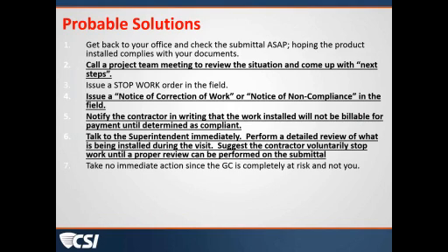Now, it could be the correct product, just as you specified, and not be an issue. The only issue is that he's installing it before he got the approved submittal back. So that is non-compliance with the contract requirements, but it's not defective. So that's just a distinction I wanted to point out. It would be defective if it was the wrong product.